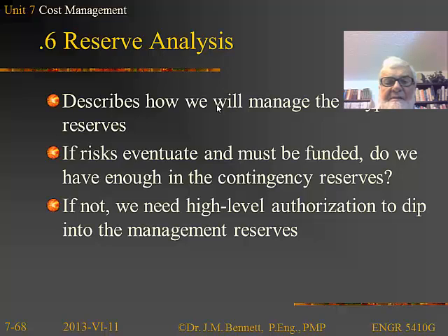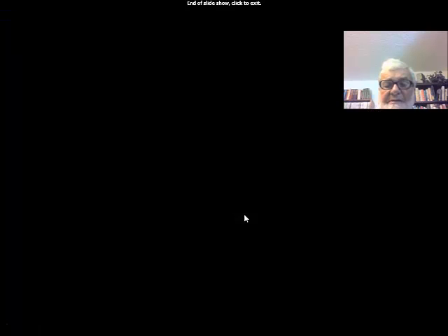Reserve analysis basically says how are we going to manage the two types of reserves. Remember, we have the project reserves that are part of the project budget, and we have management reserves that are beyond the project budget. If the risks happen and must be funded, do we have enough in the in-project reserves or the contingency funds? If we have, we'll draw out of them. If not, we need to go to the big boss and ask for high-level authorization to dip in the management reserve.